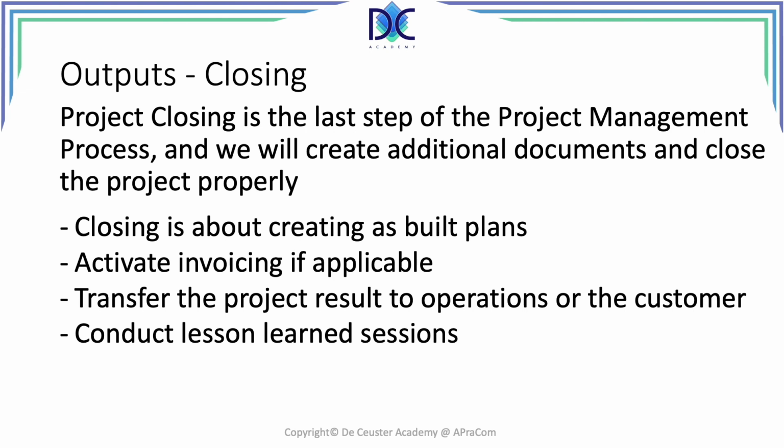We also conduct lessons learned sessions. We close contracts and disputes, also very important, because open contracts and disputes can lead to large problems later on for the company, create cash problems, and it may have to be resolved by different means. It means extra costs, extra resources, basically losses for the company.